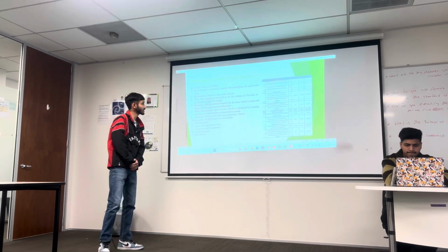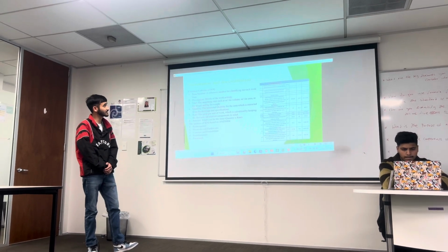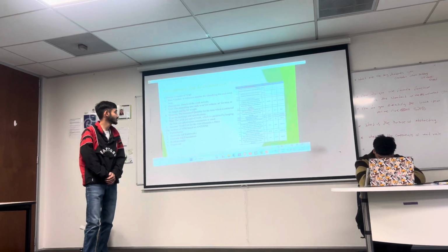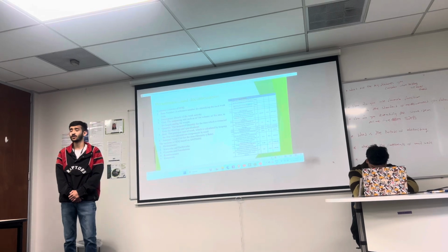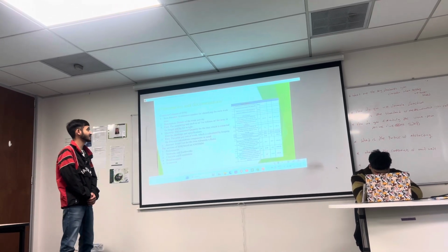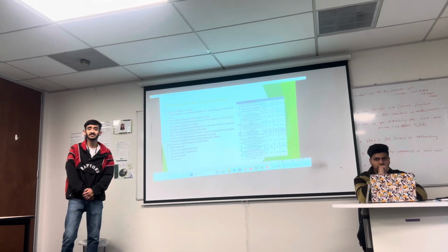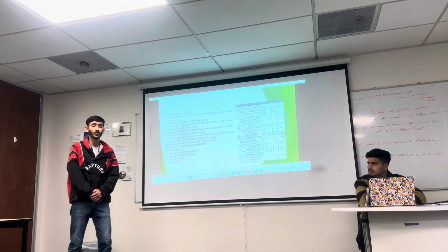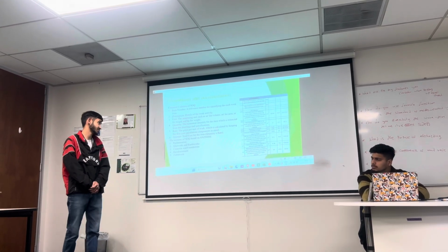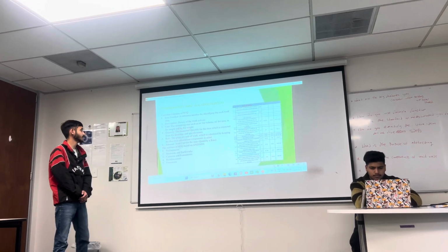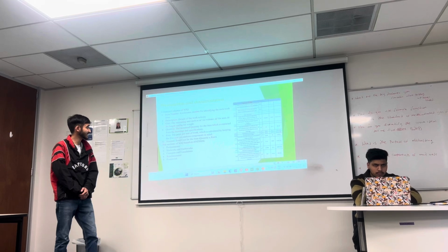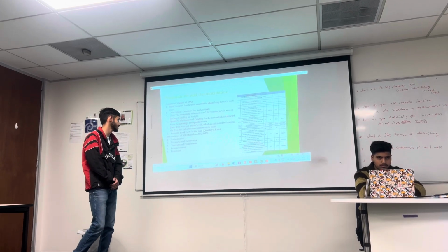So the item number is a reference number for identifying each work item. Descriptions tell the details of the work or the activity performed. Unit is a measuring unit of any item, such as meter cube for volume, meter square for area, meter for length, and kgs for measuring weight. Then quantity, the measured quantity for the item, which is extracted from the drawings and specifications.